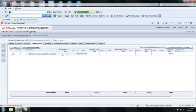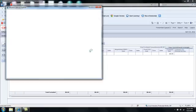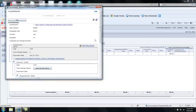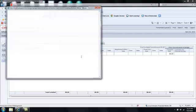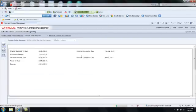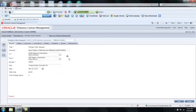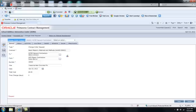I'm now going to record the quote that I received from Ace Mason, and that will advance from the estimated phase to the quoted phase. So I'll click the notepad to do so. When I want to start the quoted phase, I'll click Start Quoted Phase. And Contract Management will open up the document that I selected to be appropriate to that stage in the change management workflow. In this instance, a change order request.